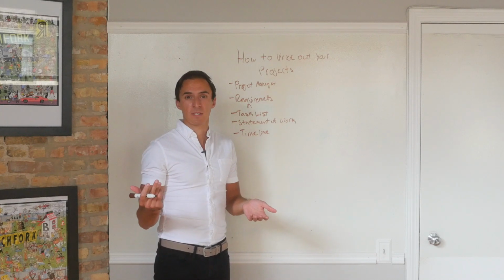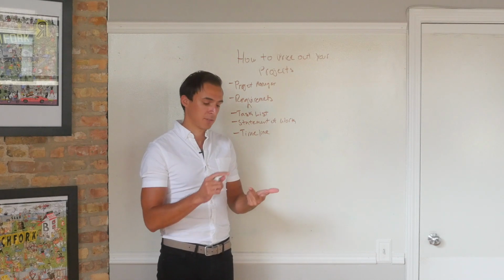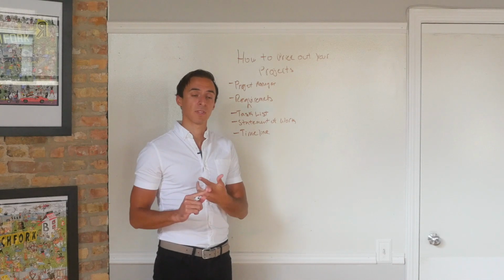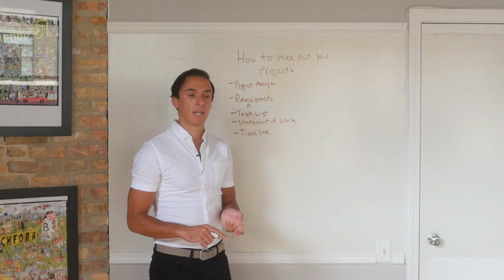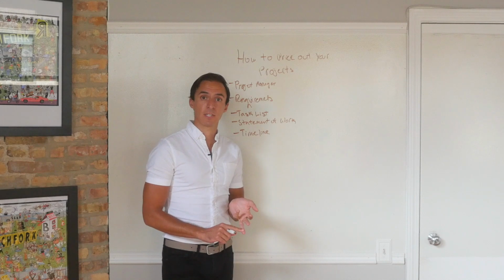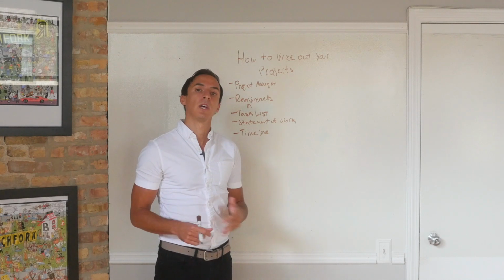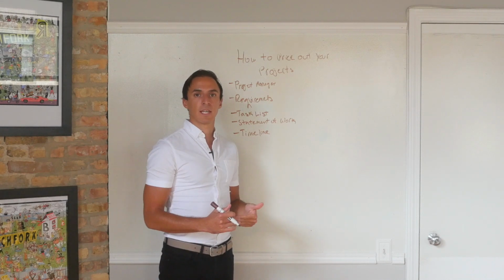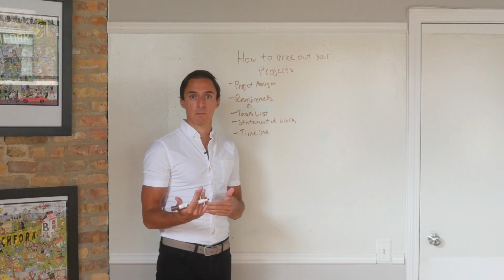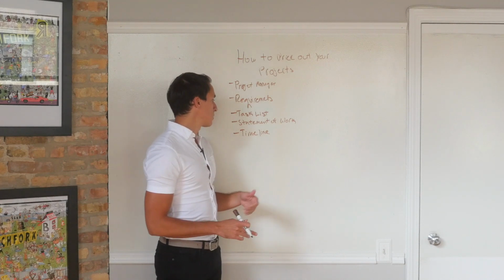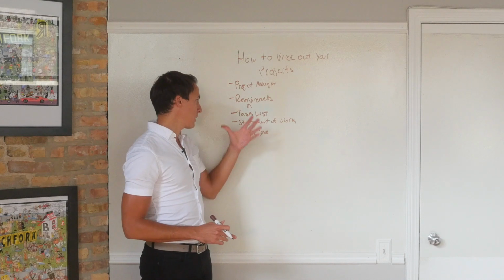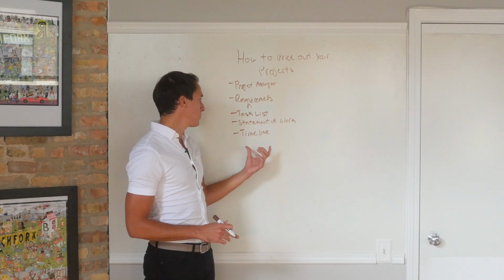and then we just need to launch it. That's really not what it's about, because there's going to be an internal kickoff. There's going to be weekly status calls, both with the client and internal meetings. There's going to be review sessions internally before a client sees a deliverable. So all these things need to be included in a project plan, and that's the job of the project manager to do that.